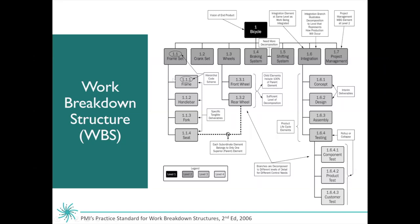Below level two would be level three, and you can tell by the numbering system as well. So we have 1 for the bicycle, 1.1 for the frame set, 1.1.1 for the actual frame. You will see that under integration, we also go down to level four — 1.6.4.1. The lowest level of your work breakdown structure is called the work package level, and this is where you'll want to focus on estimating time, cost, and resources.